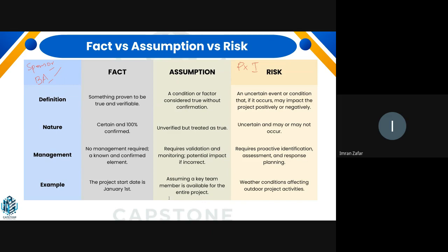In Agile, we have short cycles, so we plan for 2 to 4 weeks of work. So in that case, risks are often smaller, and you can contain them within each cycle. And also in Agile, you are doing adaptive planning as per the requirements or changes, so it inherently reduces the risk element in your project.